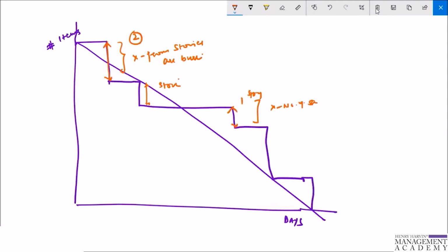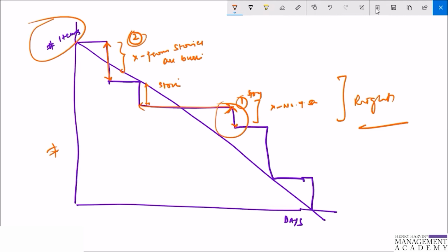Sometimes it is a big mistake that they allow this approach to continue. Generally this approach is not right, and the reason is simple: stories require different effort to be completed. The first completed story can be 2 times bigger than the second one, but the chart does not explain the real burn status. So the ideal burn down graph is not portrayed here. Generally this graph is not used where we are using items on the y-axis and days on the x-axis.